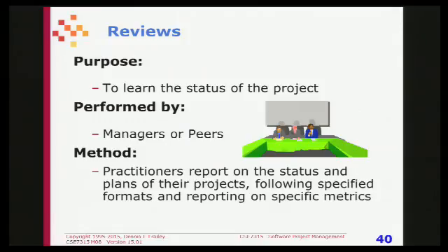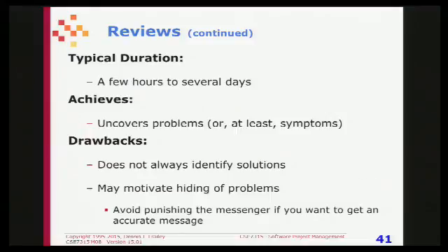Let's talk about reviews and audits. Reviews are things whose purpose is to learn the status of the project. Typically what happens is the software developers present the status of things to the managers or to their peers. A review will typically last a few hours.